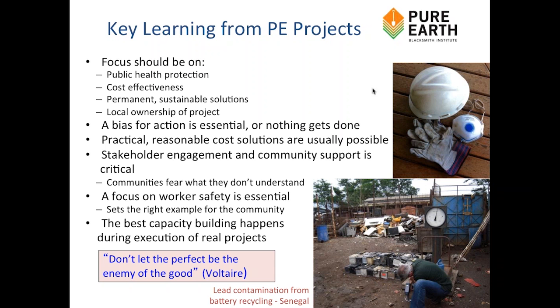Eventually, we said, well, this is going to be a phased project, and the first phase is going to focus on the highest risk soil, but we'll have to come back and address drinking water in the future. Remediation of groundwater is a whole different set of technologies and can be very expensive and time consuming, and hence we want to focus on the greatest risk reduction that we can do rather than divert important money to a lower risk alternative.